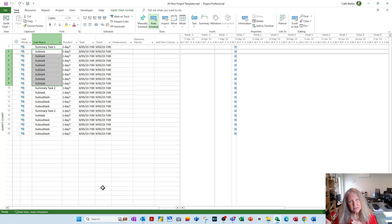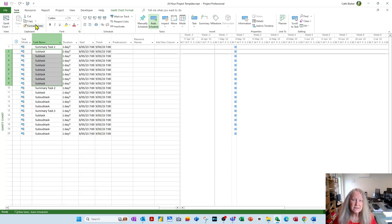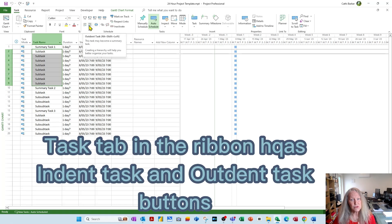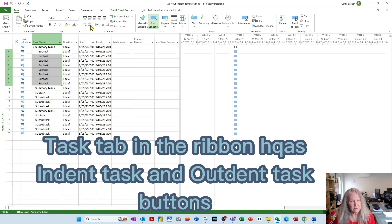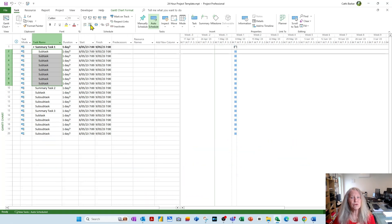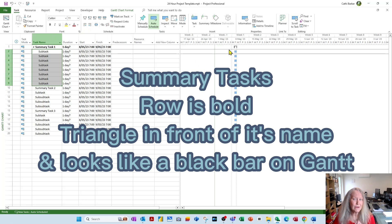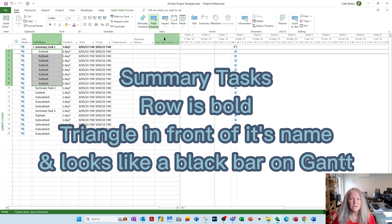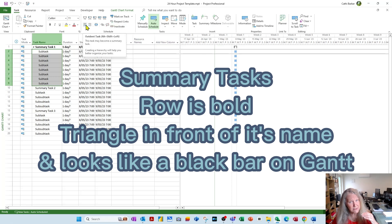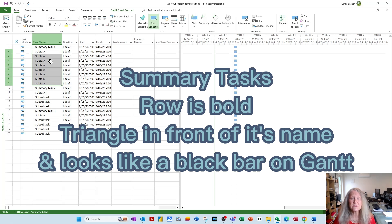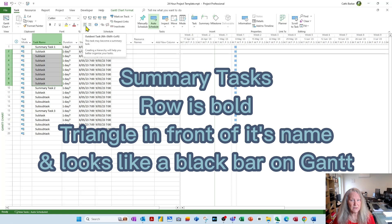Now I want to indent them so they come under the Summary Task 1. Now looking at the task tab in the ribbon, you've got two buttons. This one is indent task, and this one's outdent task. So I literally could indent those tasks, and Summary Task now goes bold. In fact, its entire row goes bold. It also acquires a black triangle in the front of its name. And also it now appears as a staple, a black staple on the Gantt chart. If I outdent those tasks, then they no longer sit under Summary Task, and therefore Summary Task is no longer bold, and is no longer technically a Summary Task.